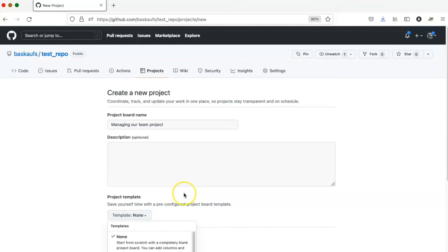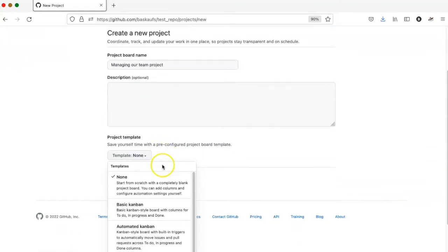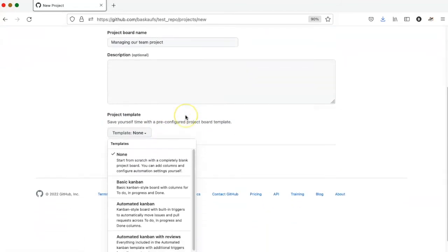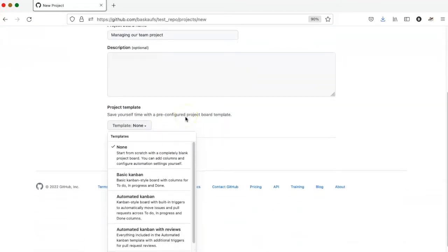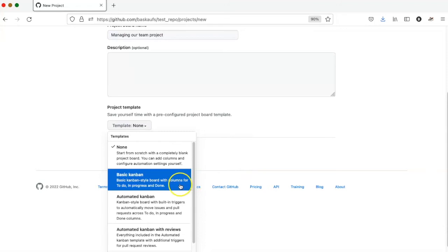There are actually several good kinds of templates here. The basic Kanban template creates three columns for to-do, in-progress, and done.